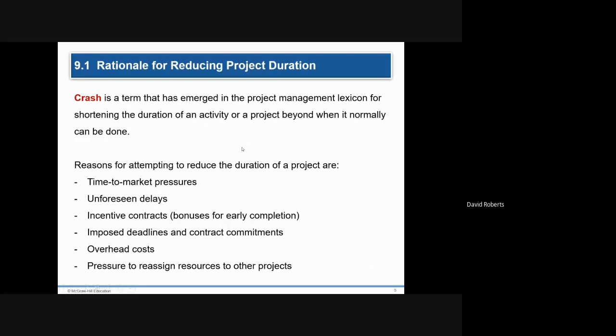It's shortening the duration of a project. It is not cost-benefit analysis. I've had this discussion with people who do not teach project management, and they think it's cost-benefit analysis. No, there is a cost and a cost only. The benefit is shorten the project duration. Now, there can also be a benefit if there's a fine for being late, but we don't deal with that in an introductory course. So some of the reasons: you need to get it to market quickly.